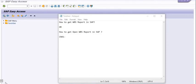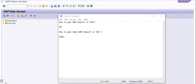First, let's understand what WBS is. WBS is Work Breakdown Structure. Once we start any project and book the cost in SAP, we need to create a project definition and get the sanction and approval of that project. We plan the material activity, service activity, and different expenditures occurring during the project life cycle. Once the WBS is complete, we capitalize and finalize it, create the asset, and submit the completion certificate to the finance and accounting team and settlement team — then you can close the WBS.